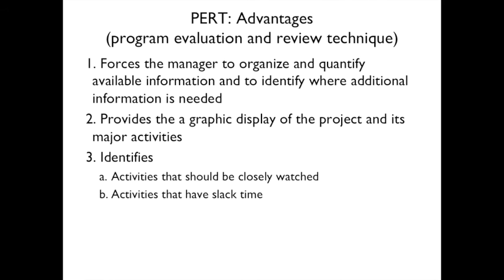PERT advantages: it forces the manager to organize and quantify available information and identify where additional information is needed. It provides a graphical display of the project and major activities, and identifies which activities should be closely watched and which have slack time.